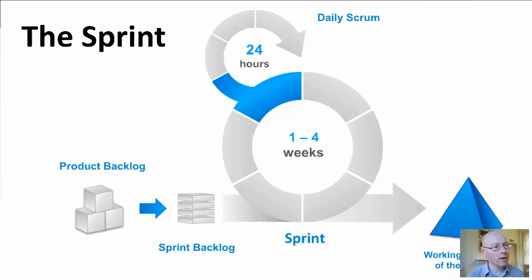Every 24 hours, we're having our scrum. This is our stand-up meeting where each member of the team says, okay, today I'm going to be doing this, and here are some things which might stop me from doing this, blockers. Again, it's a way of, without dragging things on, enabling the whole team to understand where everybody's at and to understand if they have any particular role in terms of not holding people up.